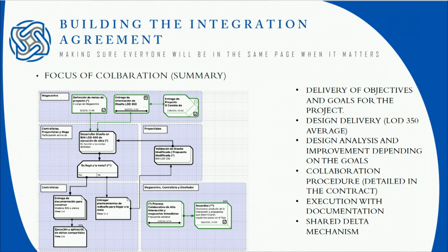and the less complex the process, the less is the fee that they're going to give you. So we needed to set that. In order to do that, we needed to make a bid with some of the constructors that were supporting us. So we told them, you can support us, but we are going to bid anyway. If you win the bid, then you can go to the second part. That is going to be an integration agreement that we were graphing here in a flow, in a behavior flow of these organizations.